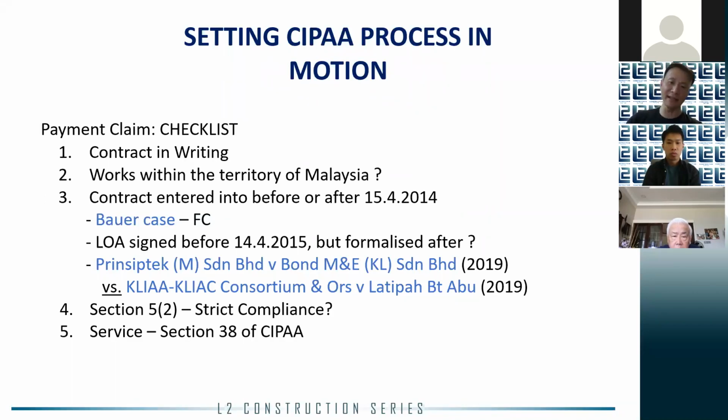Now, in another case, and it's actually quite interesting to note that KLIA was also decided by the same judge who decided in Princip Tech, but the judge decided to distinguish it from the previous decision. There was also a letter of award signed before 15th of April 2014, and a formalized agreement which came later, just like Princip Tech. But the difference is that the court finds that in KLIA, the formalized agreement which came later has some alteration of certain conditions that were different from the original letter of award.